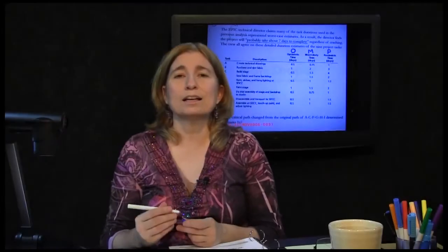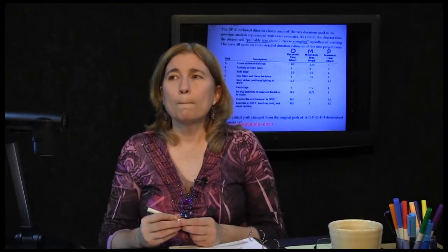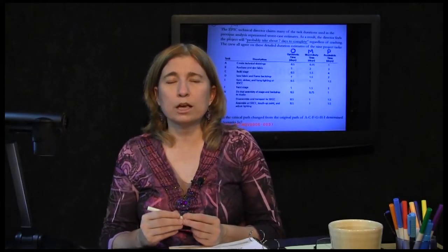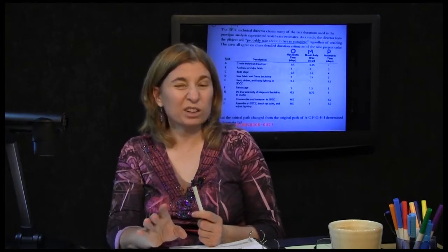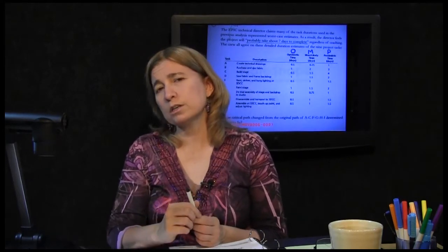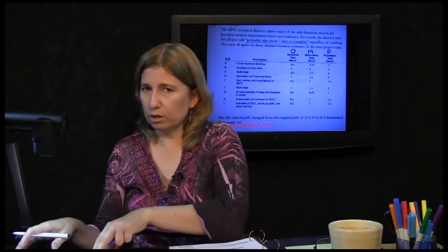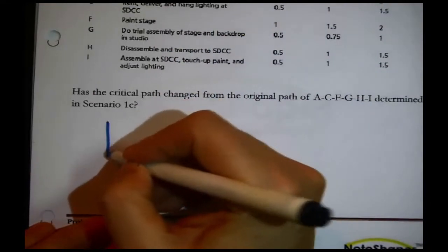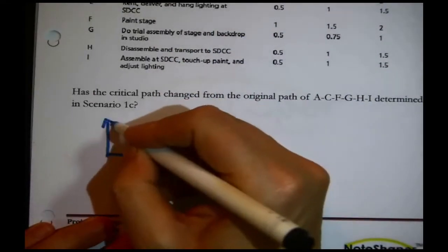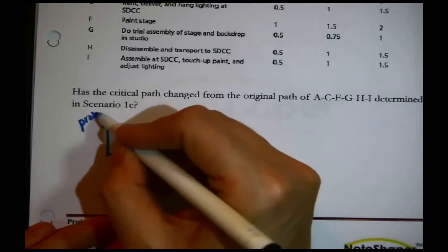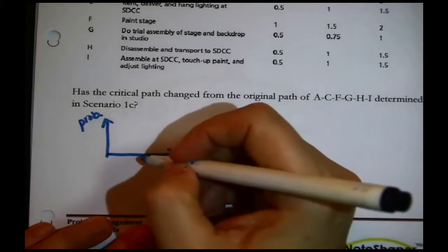These 3 estimates are meant to represent an assumption that the true task time, which we're not really exactly sure what it is, is beta distributed. Oh, by the way, beta distributed? There's a little bit of room down here at the bottom of the page. Yeah, a beta distribution. This is the probability that the task will take a certain amount of time.